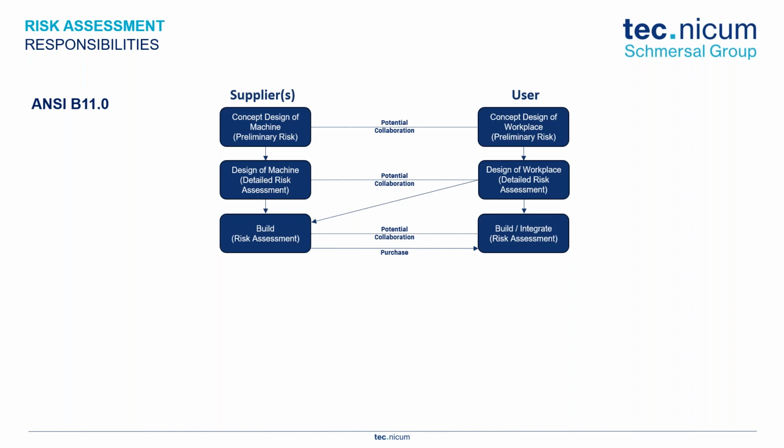Panels are being put on. We're getting power to the machine. We want some FATs, right? Here we can do another risk assessment. Now that the machine is being built, we can see some additional aspects that we couldn't see with the drawings. Maybe we change the way that we're going to interact with this machine. But here's the third stage, a risk assessment.